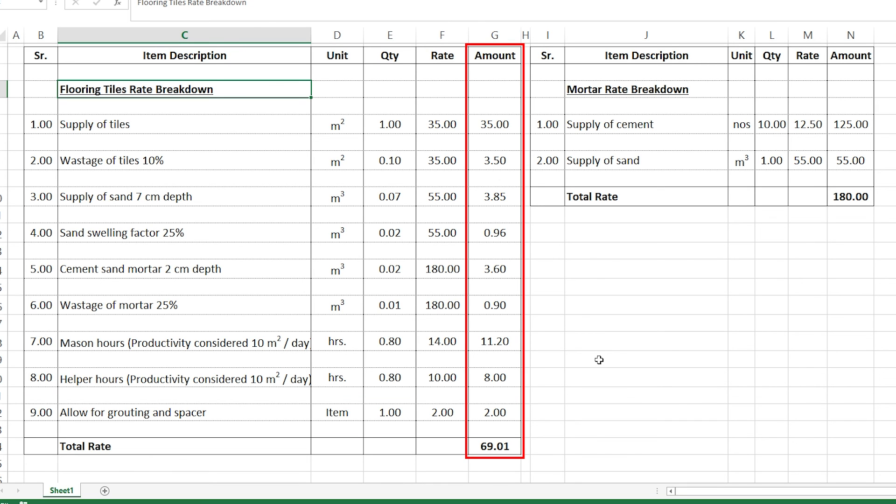We also allow 2 dirhams for grouting and spacers, bringing the total to approximately 69 to 70 dirhams per square meter. This is how you calculate the rate of an item for deterministic cost estimation. All this can be done in Excel or any cost estimation software depending on your preference and project size. Thank you so much for watching — don't forget to support us by joining the channel membership, and I'll see you in the next video.